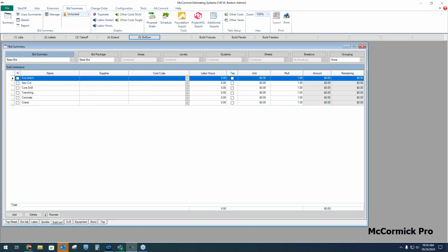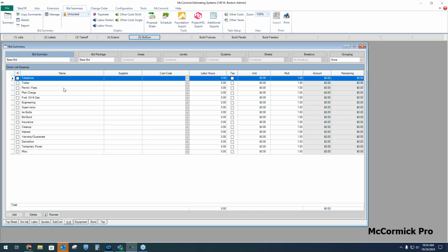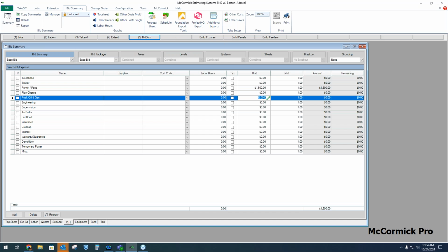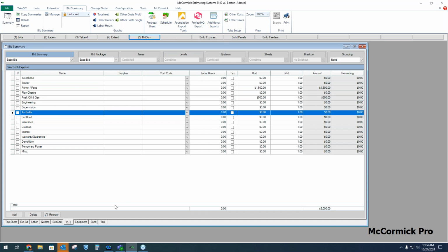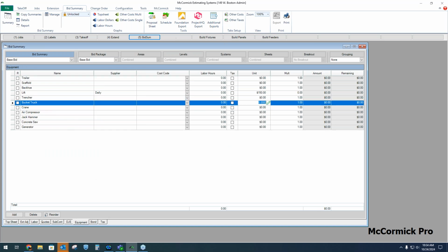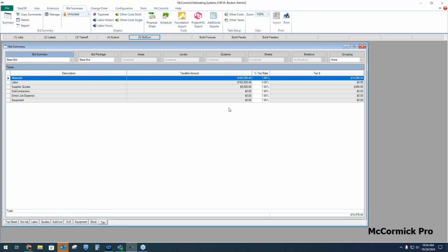Now, this folder is for subcontractor expenses. I'm subbing out fire alarm. That's going to be $3,500. DJE is direct job expenses, things like permits and fees and fuel. Equipment, I need a bucket truck, 2,200. This folder shows an example bond table, and then this shows my tax rate. Of course, this is set up as part of my template. I could change that if need be.